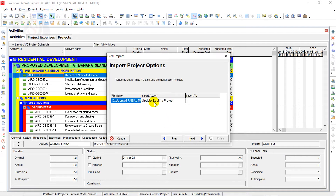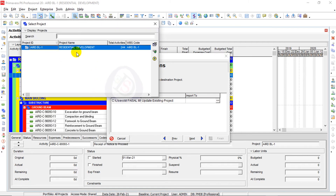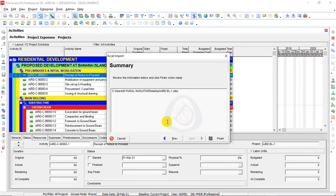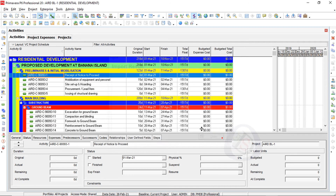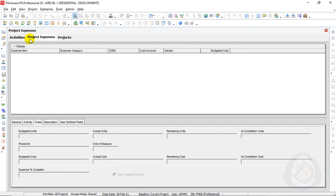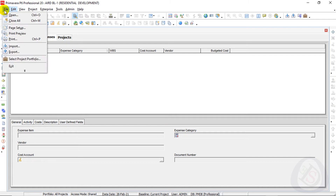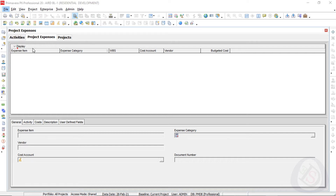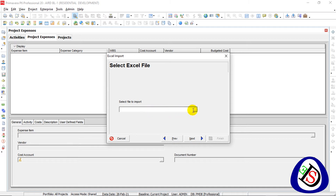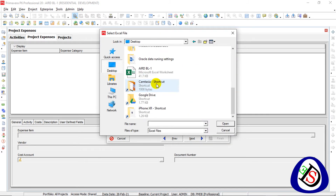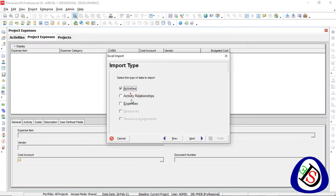For Import Action I select 'Update Existing.' I enter the project name — Residential Project BL1 — click the plus button, then Next, and Finish. The import completes. I check Project Expenses but see no expenses assigned. I realize the file was not properly closed before — that's why the error occurred.